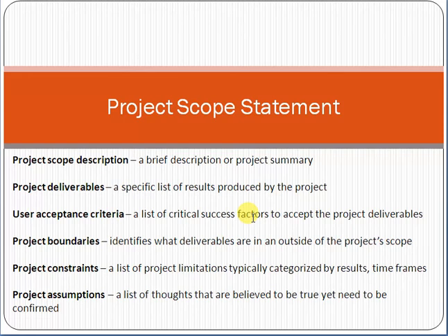If all the issues in the SIT are solved, SIT will be considered closed and SIT sign-off will be provided. If all the scope has been delivered successfully, the customer will provide the final acceptance certificate at production. All these things can be called user acceptance criteria.